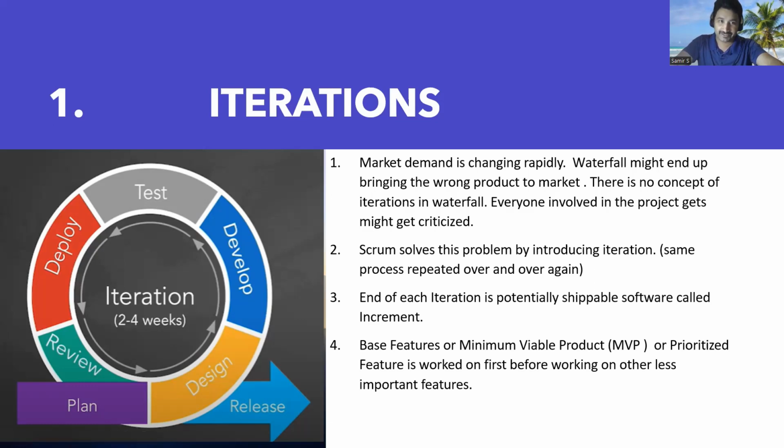Then development takes at least another 1 month, because development always takes more time. Then the testing phase takes another 1 month. Then implementation or deployment to the production environment takes another few weeks, because you have to monitor and make sure that the software is stable. This entire thing in waterfall might take anywhere from 4 to 6 months.